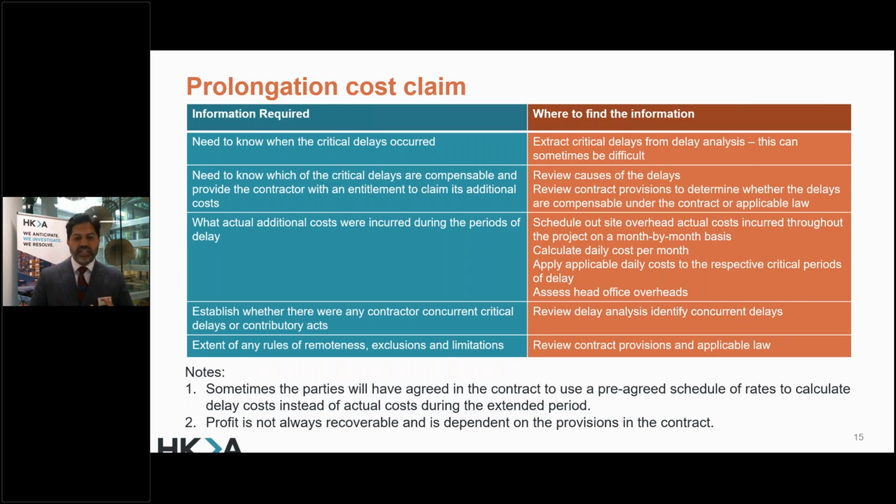If the contract does not have a provision of extension of time, you can't claim it. You just carry on. But coming back to the question of extension of time, why do clients need an extension of time clause in the contract? Because if they don't have an extension of time clause in the contract, they cannot hold their contractor or consultant accountable to when finish or completion will be achieved.